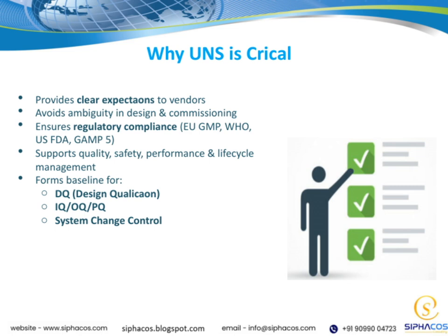Supporting quality, safety, performance, and lifecycle management is another key reason why this approach is so important. It creates a solid foundation that guides us through every stage, from initial design to ongoing maintenance. This baseline is fundamental for several critical activities, including design qualification, installation qualification, operational qualification, performance qualification, and system change control. Having a clear baseline helps us verify and validate each step effectively, ensuring everything functions as intended.